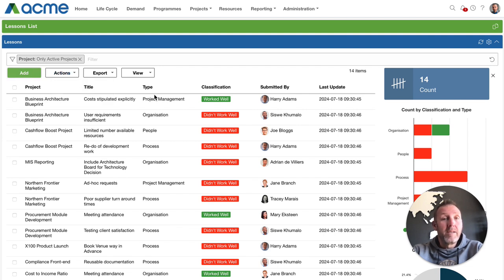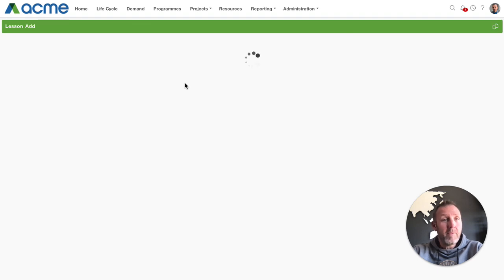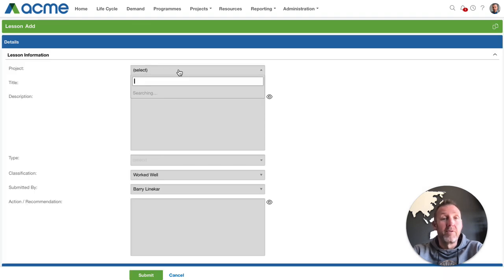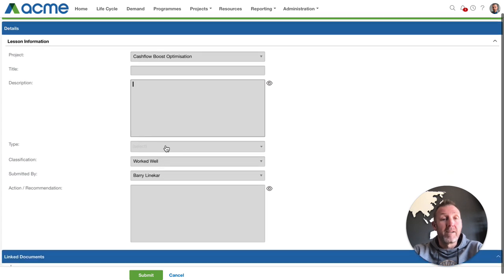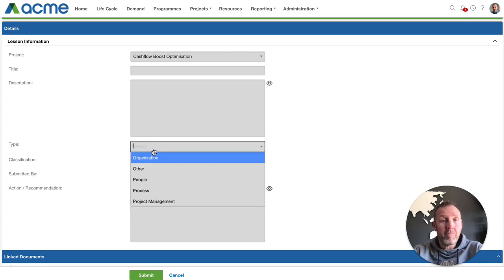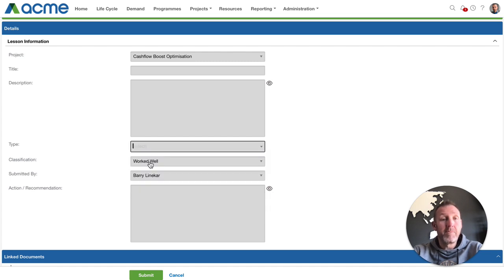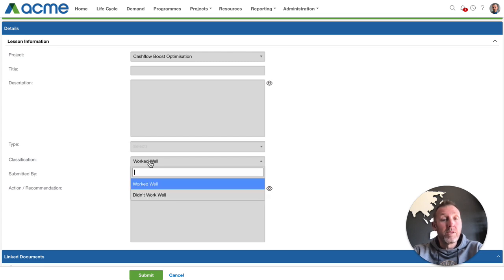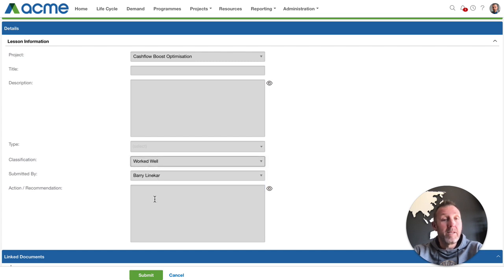To record a lesson in PPO is fairly simple. Out of the box, we provide the ability to select the project that the lesson was learnt on, the title, the description, provide a type of lesson, and here we cover things like process, people, organization, project management, other, whether the lesson was something that worked well or something that didn't work well, who submitted the lesson, and then any actions and recommendations.